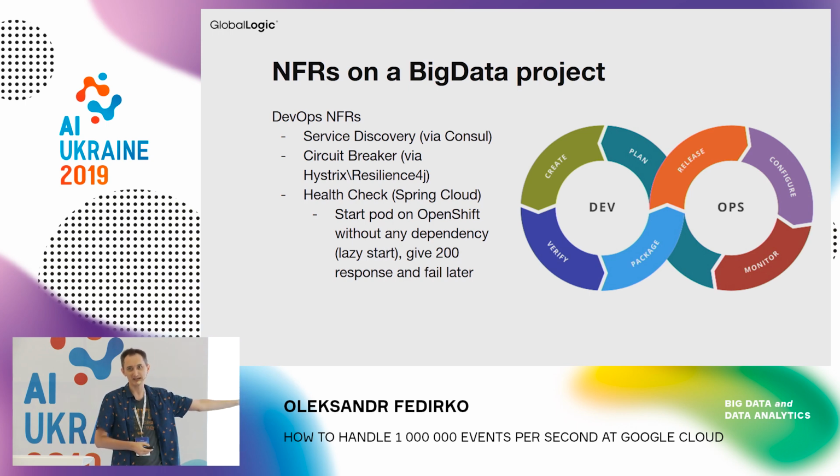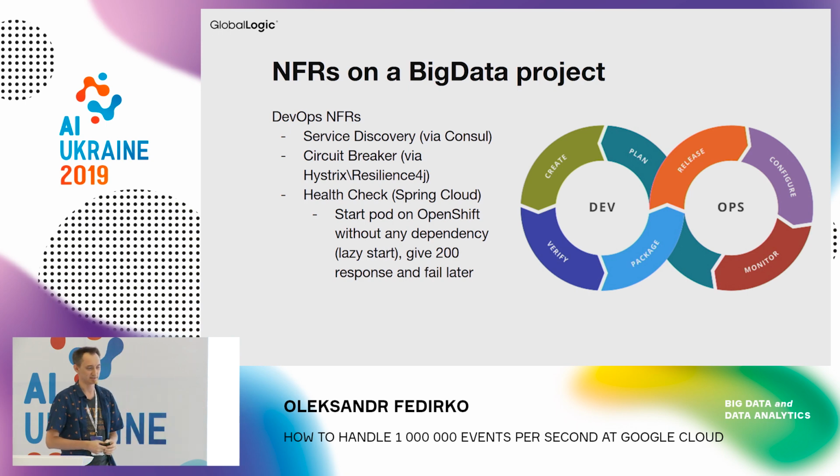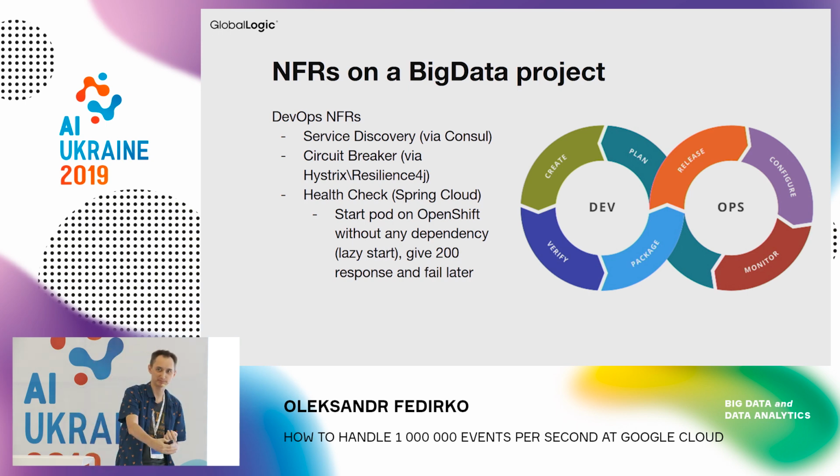If you discover these gaps at the end of your project, that's going to be just a disaster. So they told us, okay, we want every component of your applications to follow the circuit breaker paradigm. We had to embed Hystrix and Resilience4j very quickly. That was really a surprise for us that DevOps brought this at the late game of the project.